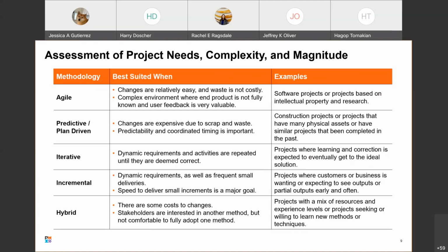You've got sunk costs in everything that you've done already. So the sunk cost for delivery time is huge compared with an Agile project where sunk cost is basically 2 weeks' worth of effort. Because that's how often you should ideally be interacting with the customer.